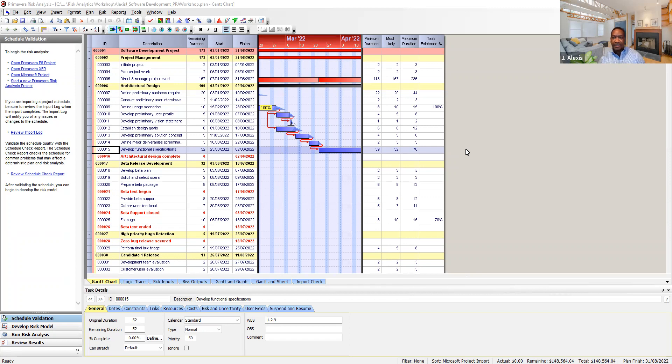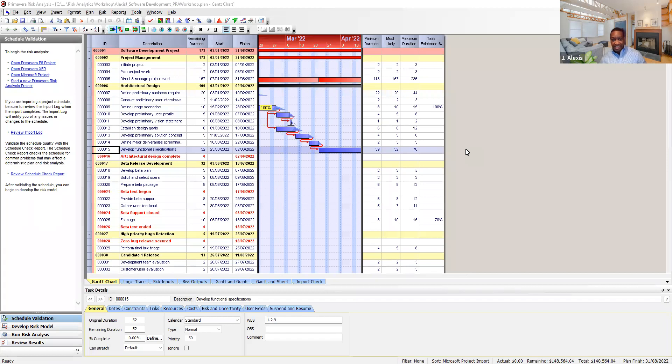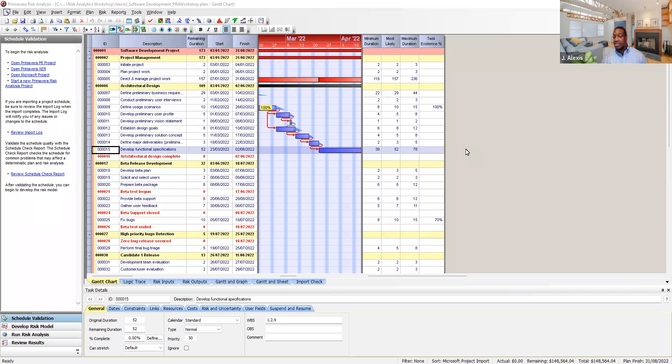To display the tornado graph you must first run the risk analysis. After running the risk analysis you can generate a report to display the tornado graph.